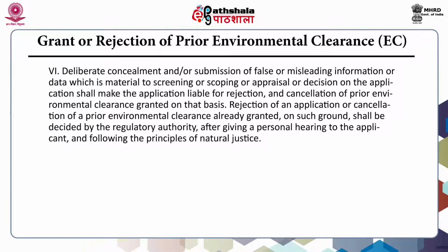Further, deliberate concealment and or submission of false or misleading information or data which is material to screening or scoping or appraisal for decision on the application shall make the applicant liable for rejection and cancellation of prior environmental clearance granted on that basis.